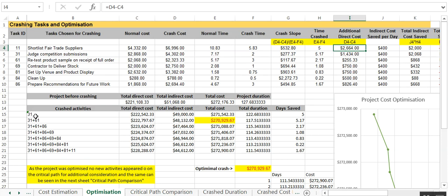They've done 31, though I would again think if that's the lowest, we would have done that first, and that's the second. What they've done is they've done it as all the days saved. Now, I can see why you would do this out of efficiency, but there's a logic problem, is that as you crash each activity, you may actually create other alternate paths. So that's why we like crashing it one day at a time rather than crashing them as bundles.